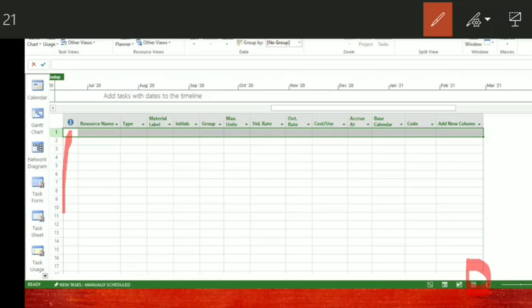When we do the practical example, you will understand, a small red picture comes there. If the resource is available in 4 numbers and you are allocating more than that, there is an over allocation, and that will be highlighted there. The indicator column is highly useful for graphical representation.